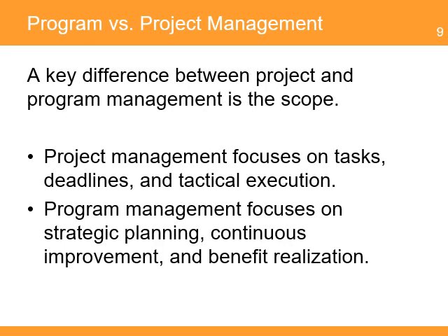The main argument for having a program is to exploit the economies of scale and reduce the cost of coordination and risks. The project manager's job is to ensure that the project succeeds. The program manager, on the other hand, is concerned with the successful achievement of the aggregated benefits that come as a result of the projects in the program. Programs deliver outcomes, while projects deliver outputs. Program management is concerned with doing the right projects, while project management is about doing the projects right. Successful projects deliver on time, to budget, and to specification, whereas successful programs deliver long-term benefits.